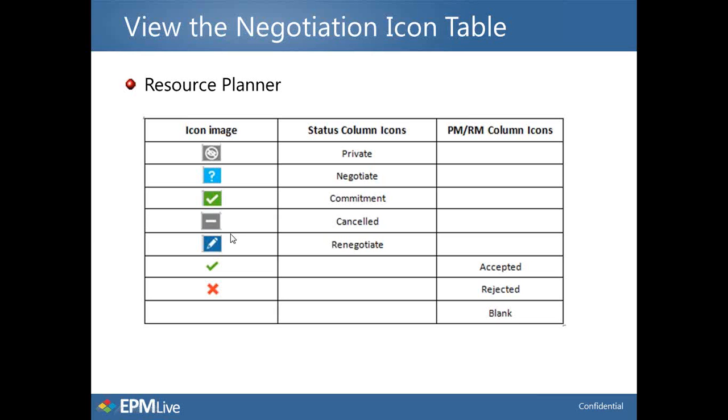After the 3 steps, should I change something? If she sends it back to me and perhaps I want to add additional hours, or maybe the resource that she's added to the resource plan doesn't work for me, and I change that, that resource negotiation will go not from a commitment but back into renegotiate. So she'll have to approve the changes that I've made.